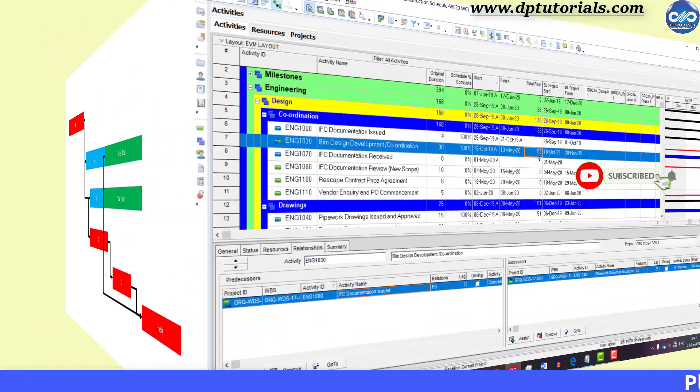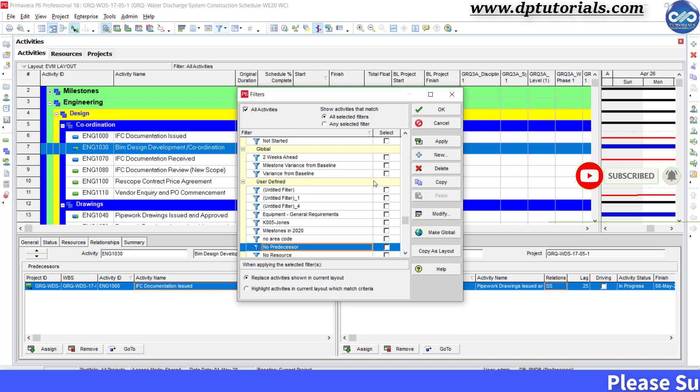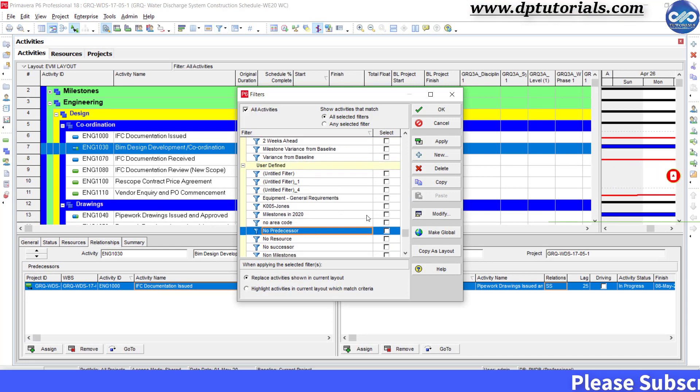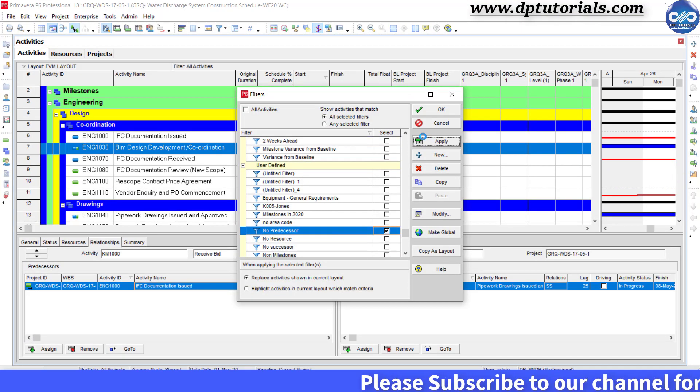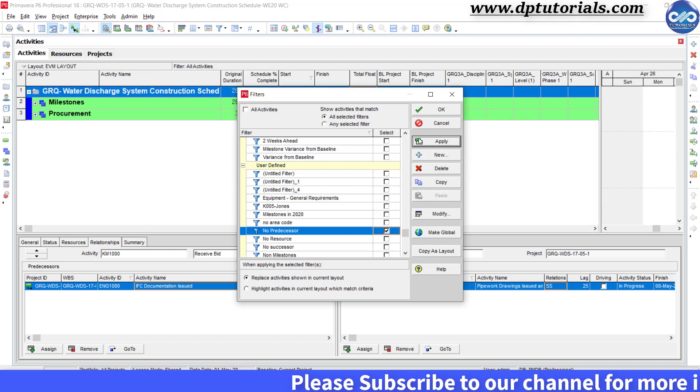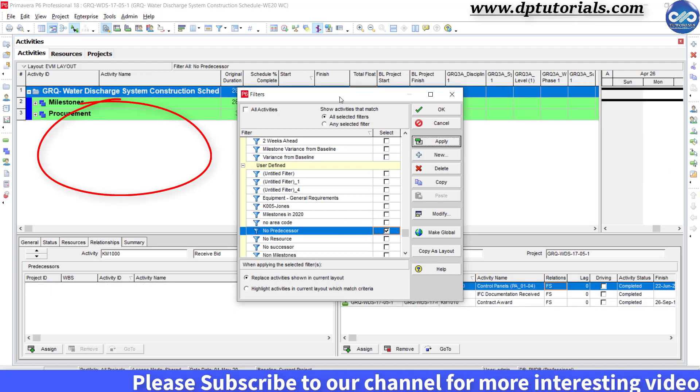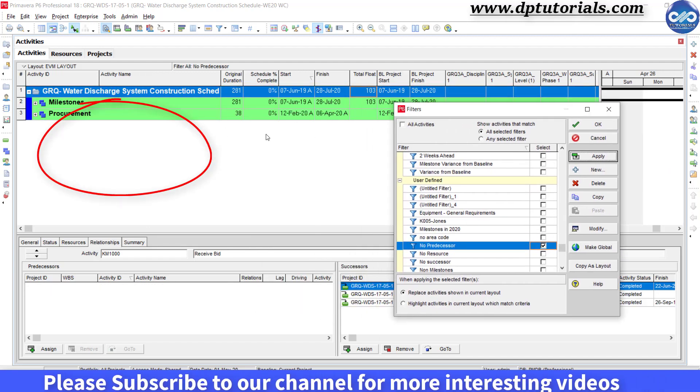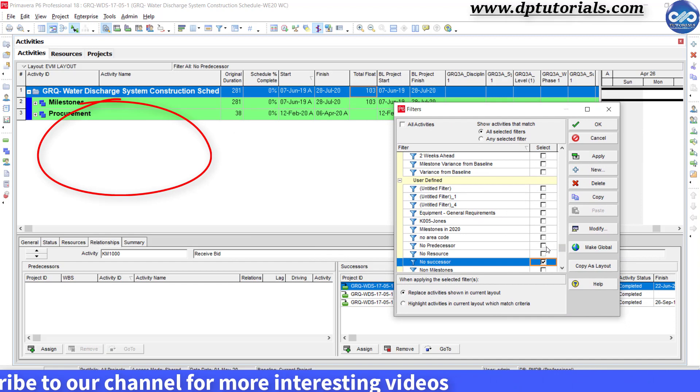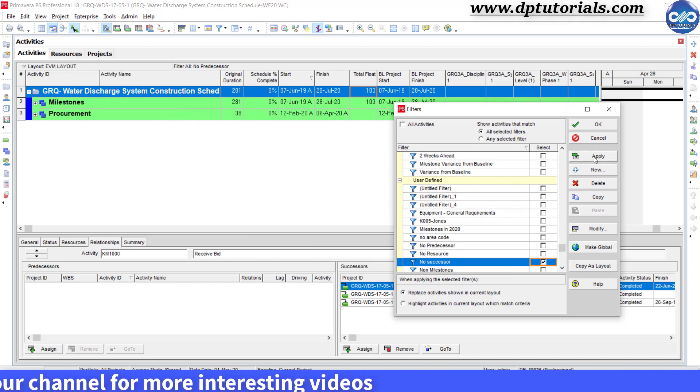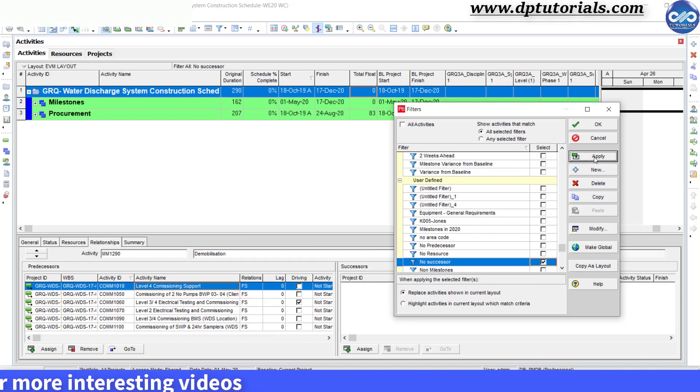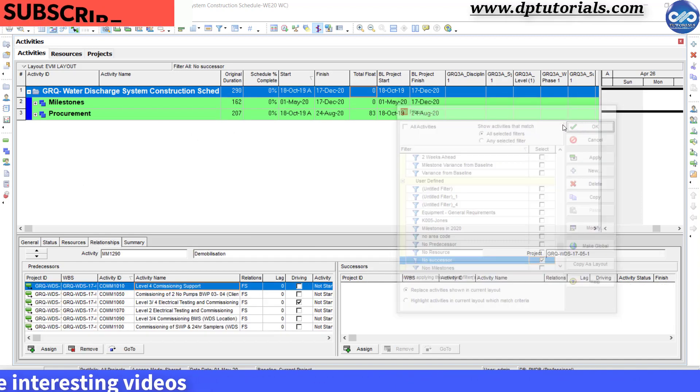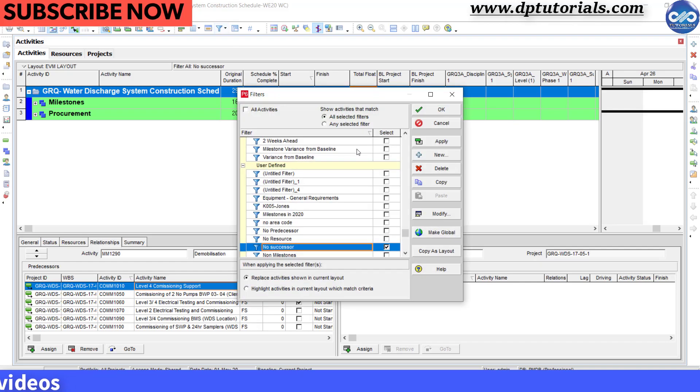In this sample project, let me run the filter to check no successor and no predecessor, and you will see that there are no activities shown. You can create your own user-defined filters like this. That means this schedule is good.